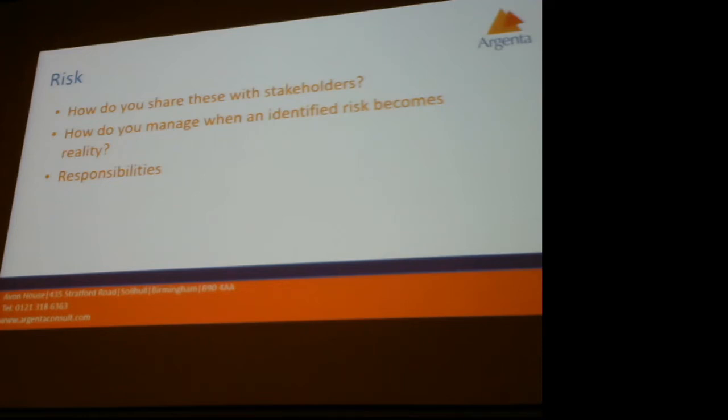Because I think along with the traditional distribution stuff, there's probably other people involved in that. So potentially a third party, or a database that somebody else owns, or an API you need to communicate with. It's critical to identify those types of things and then go out in front and approach the people who are in control of those, to make sure they're aware of what you're trying to do, and any access that you need can be ironed out right at the start.